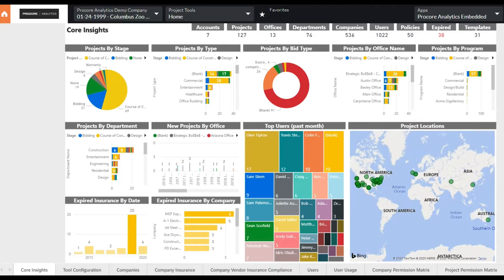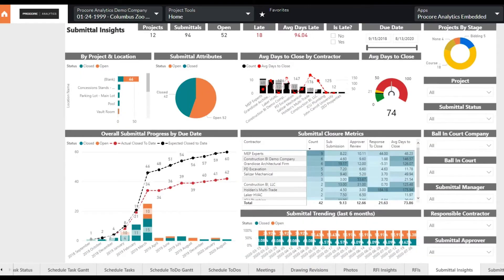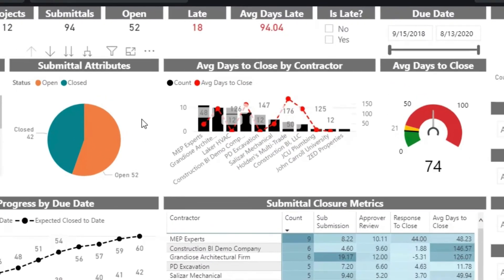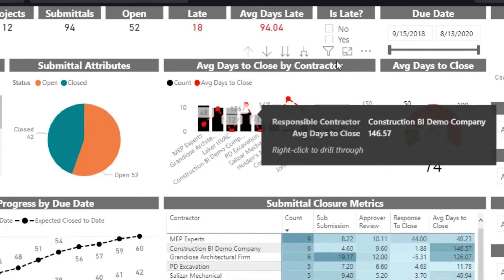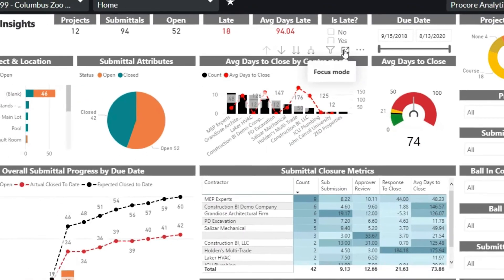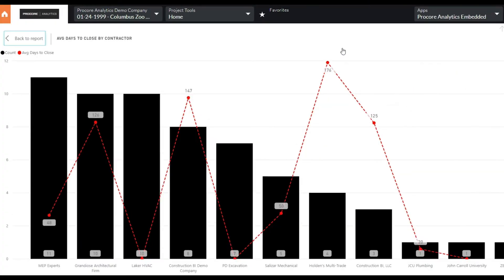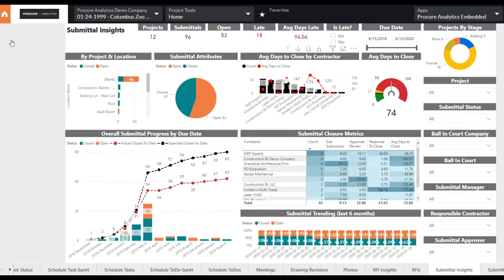One way to manage risk is to understand how long contractors are taking to close out things like submittals and punch items. Having average closure rates beyond your key performance indicators can lead to schedule delays and potential cost overruns. Let's have a look at the Procore Analytics Submittal Insights page.